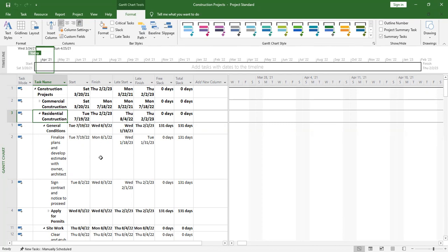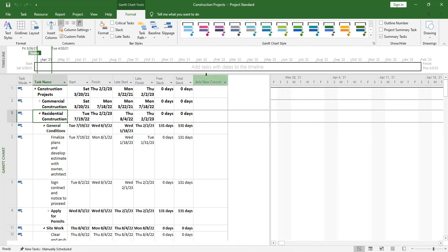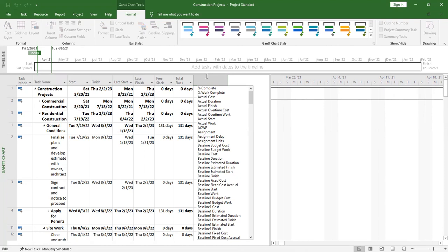Then the sub-projects under that, or what we could call level 2, are named 1.1, then 1.2, then 1.3. Then when you go down, it will be 1.1.1, like that. So we want to have a look at how you represent a work breakdown structure here in MS Project.